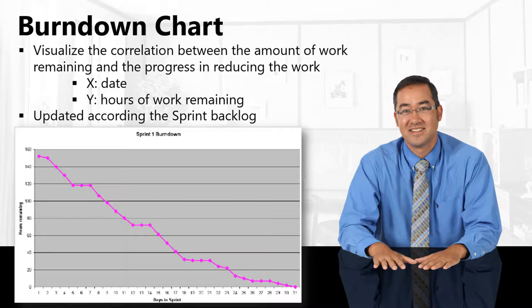The burndown chart simply visualizes the correlation between the amount of work remaining and the progress in reducing that work. On the x-axis (horizontal) you have the days in the sprint, and on the y-axis (vertical) you have the hours remaining. The chart is updated according to the sprint backlog as you progress through your backlog items, giving you a visual picture of work remaining versus progress.